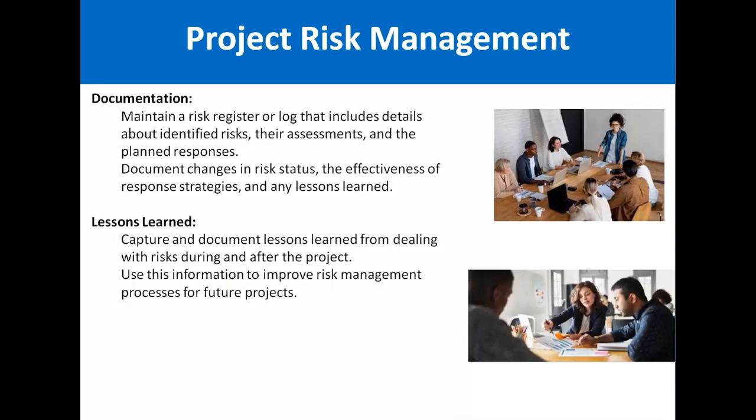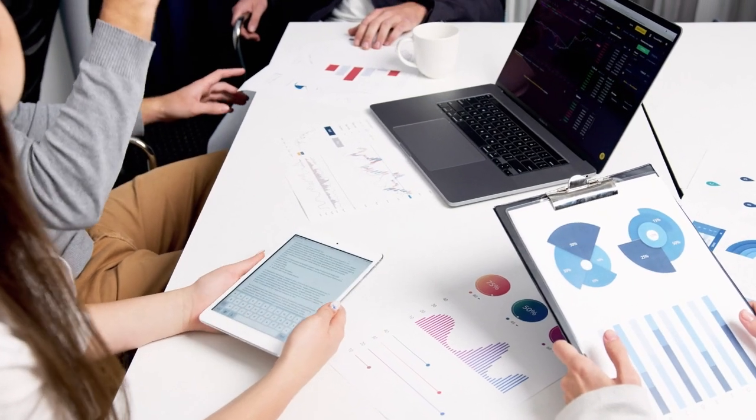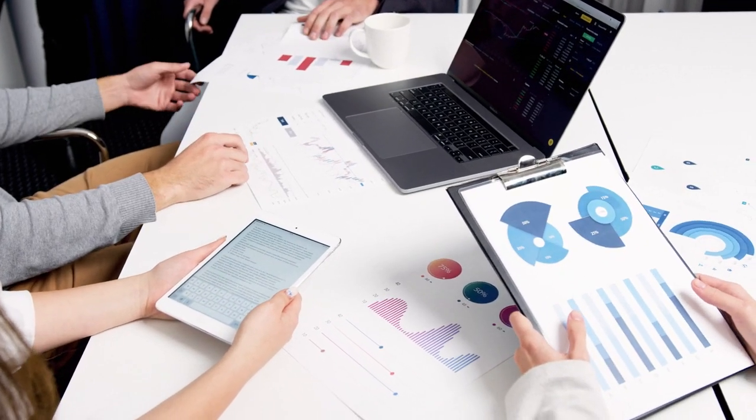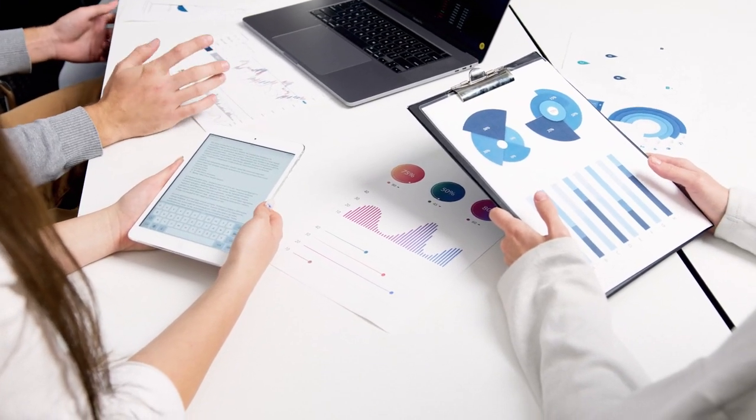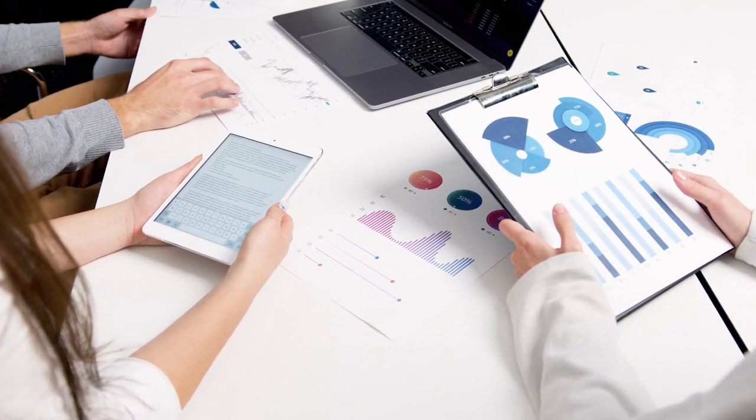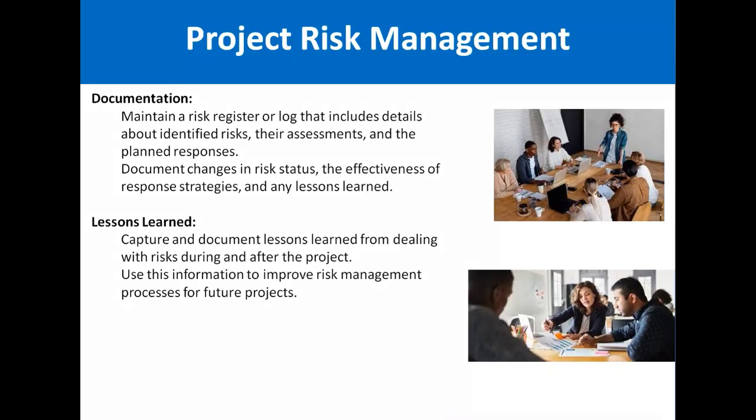Documentation. Documentation means maintaining a risk register or a log that includes details about identified risks, their assessments, and the planned responses. Document changes in risk status, effectiveness of risk strategies, and any lessons learned as well.